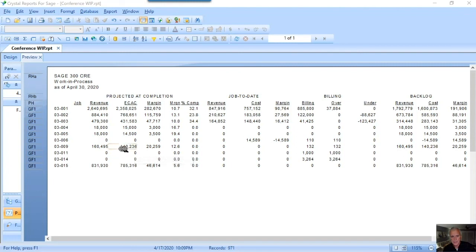And then as we go down, we've got a job here that may be a little pre-billing on a few jobs, maybe pre-construction or material. Nothing substantial there. And then one job that's purely backlog and not kicked off yet. So as you go down the WIP report, it's clear visibility to the story on each job and things that the owners and execs, key decision makers, need to be aware of. And then for not only margin control and cash flow, but planning resource requirements, and then where the company stands in its ability to cover overhead.